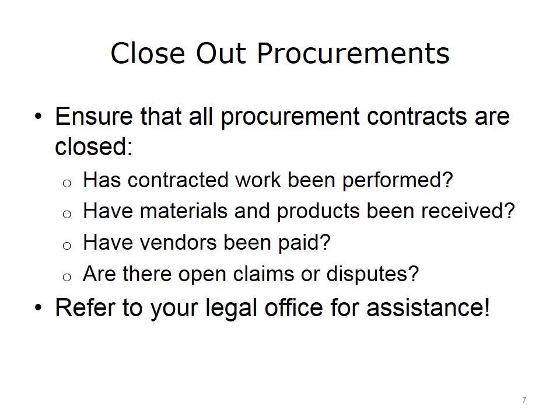An important activity during closeout is to identify ongoing procurements and close them off successfully. Procurements and contracts require special attention at the end of a project. Have the vendors been paid? Has the contracted work been performed? Have materials and products from vendors and suppliers been received? Are there open claims or disputes that can be resolved within the project timeframe? Some contracts specify dispute resolution processes. Most often there will be an organizational entity to help, such as the legal office, to provide advice and counsel on procurements and contracts.